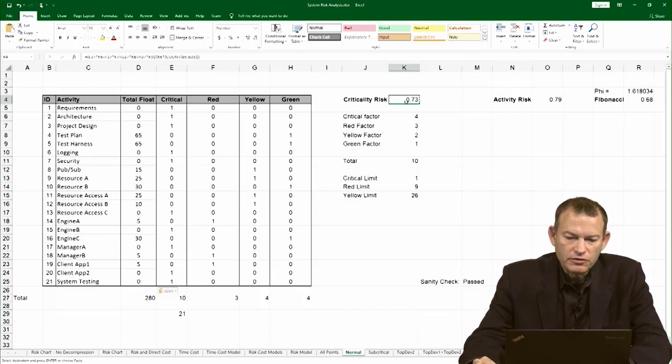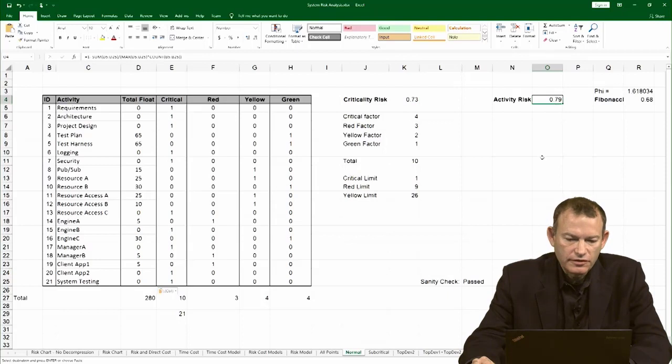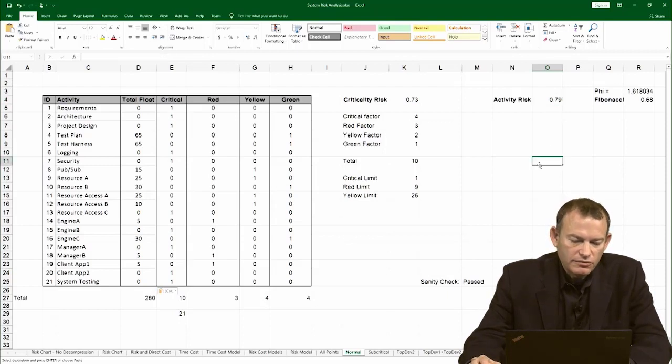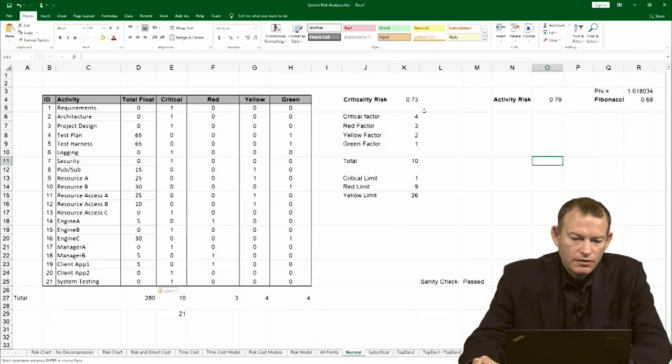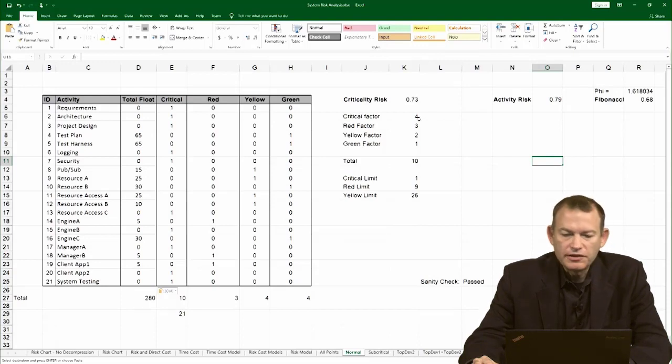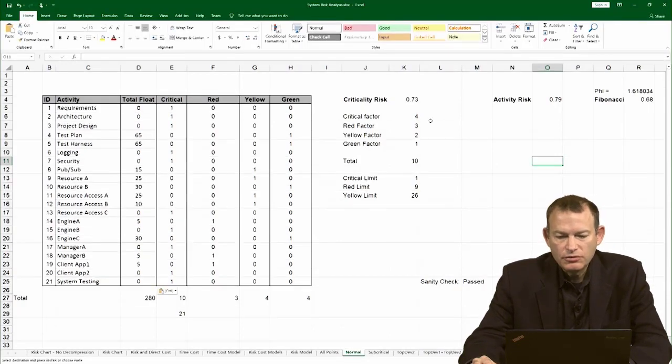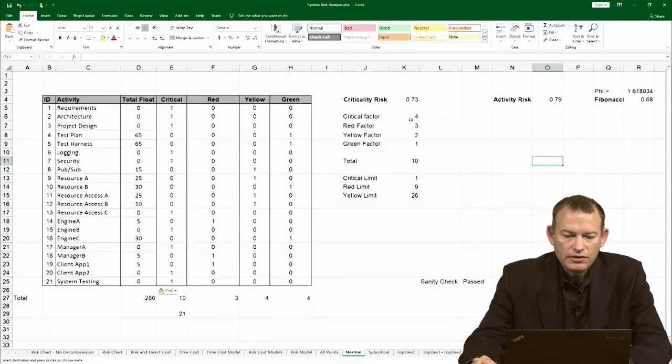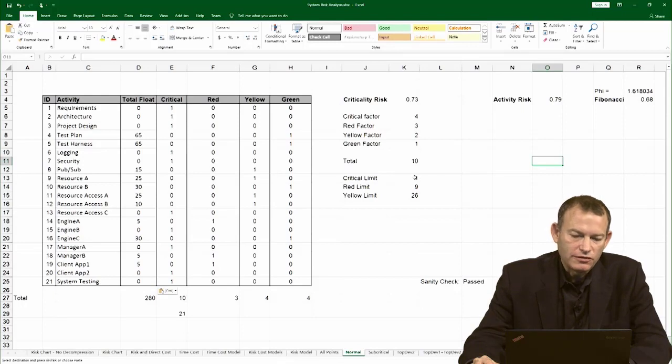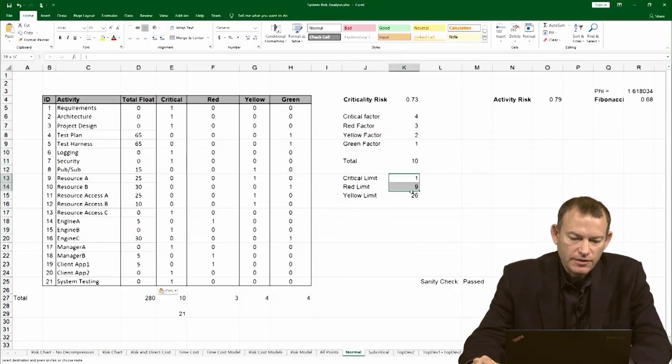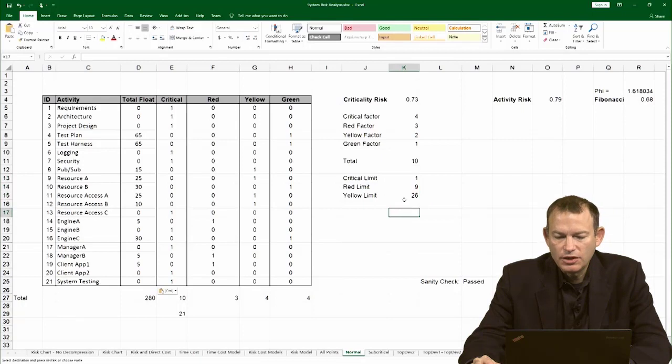You can see criticality at 0.73, activity at 0.79. Here's how the spreadsheet calculates the various risk numbers. For criticality, the first thing you have to do is tell it what are the limits - what is red, what is yellow, what is green. And you do it based on these values. It's completely customizable.